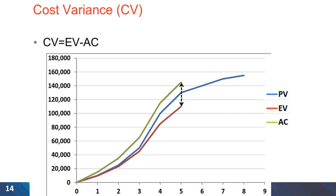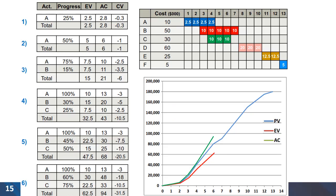Cost variance, which is another performance metric for the project, is the difference between earned value and actual cost. Cost variances are tabulated in the fifth column. As you can see in the plot, the earned value graph sits below actual cost, indicating a negative cost variance.